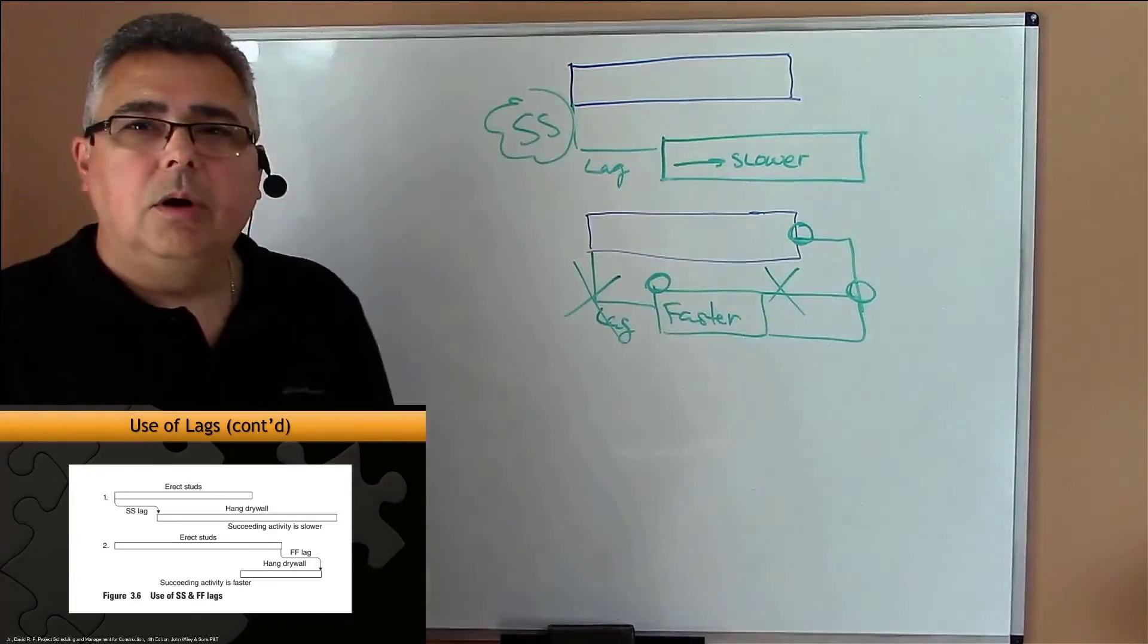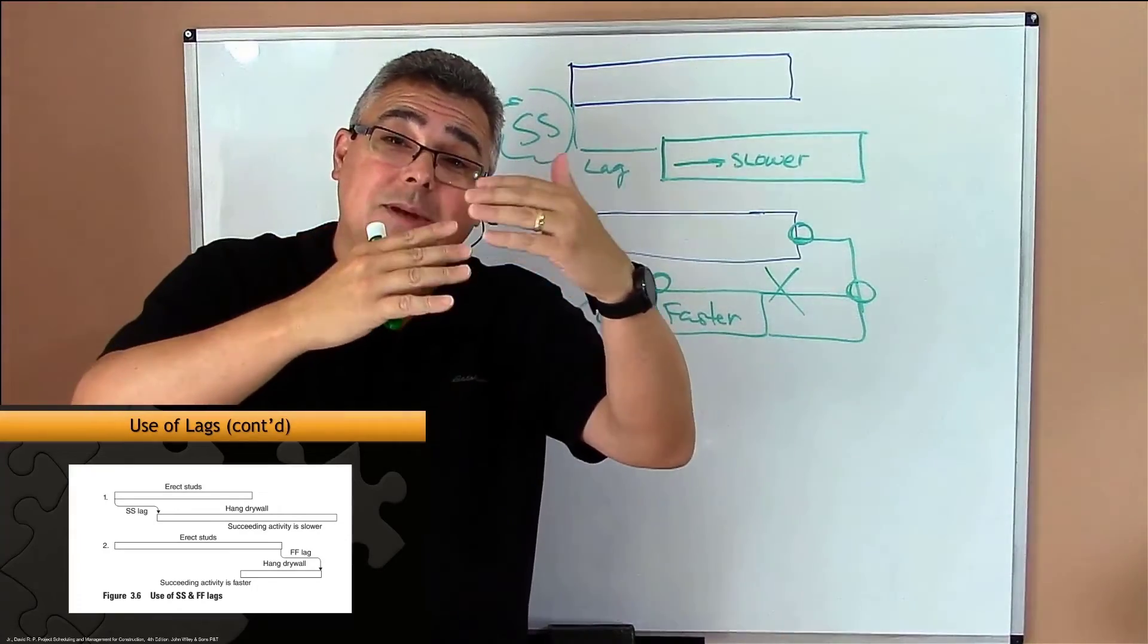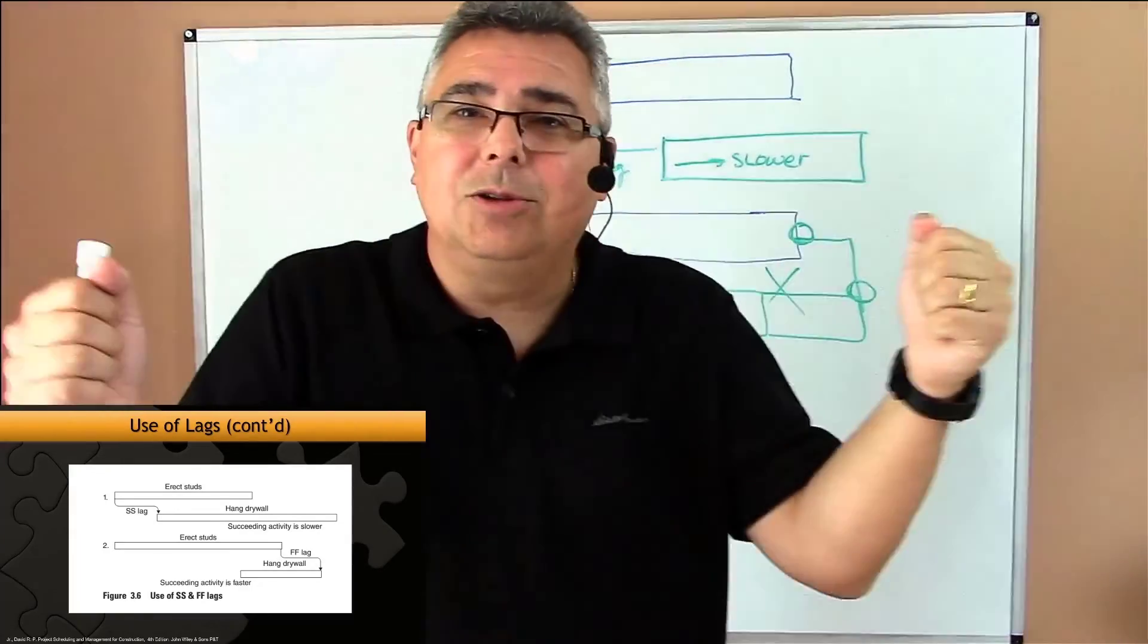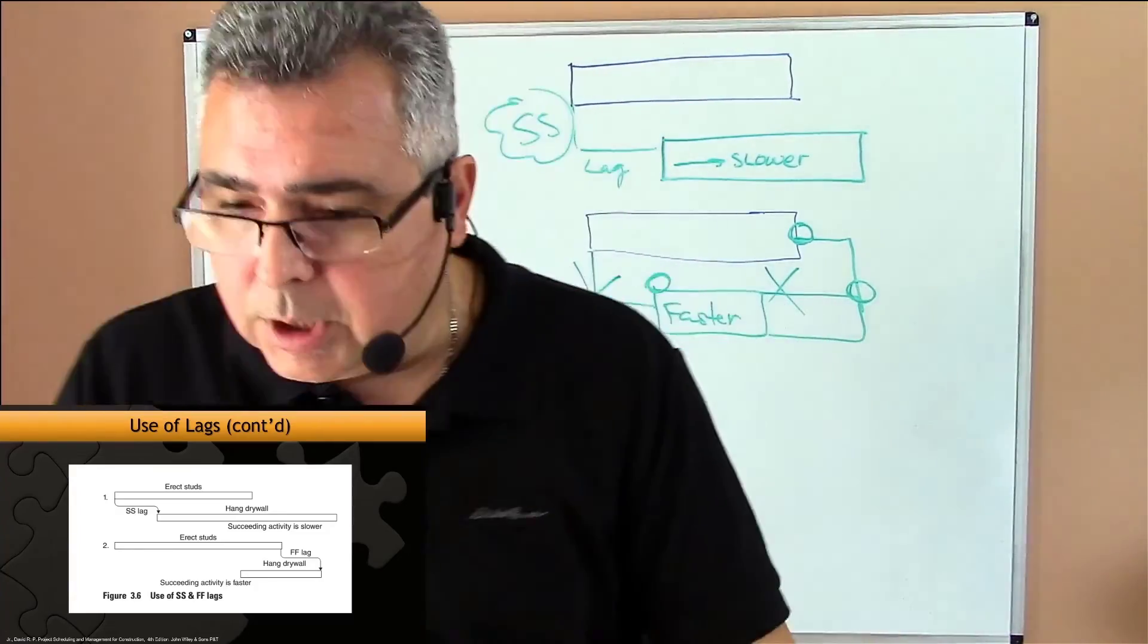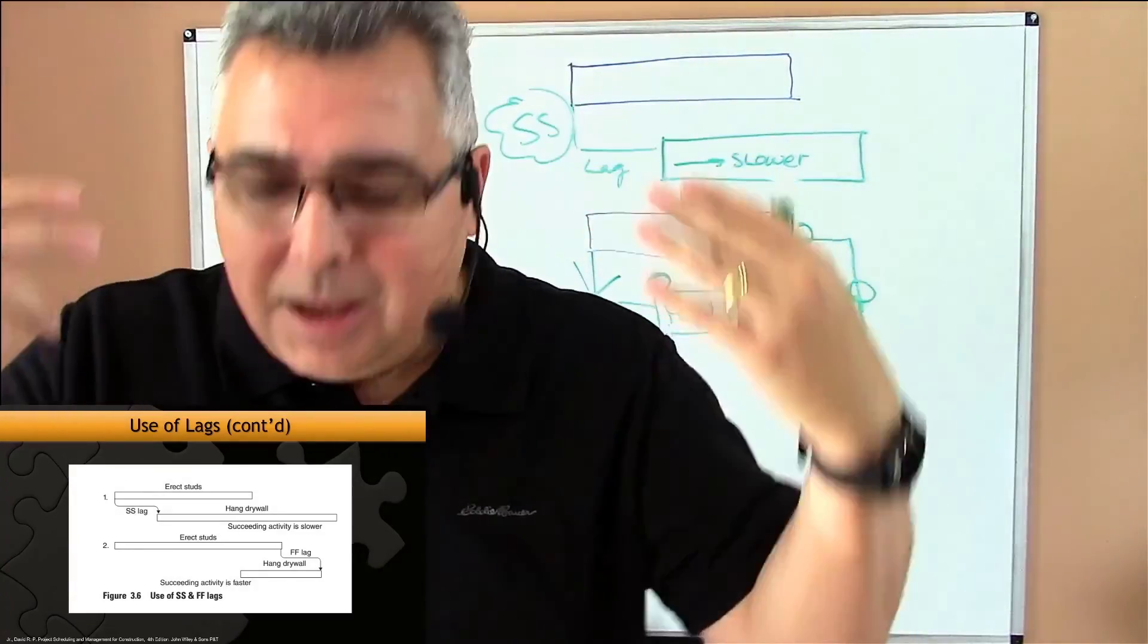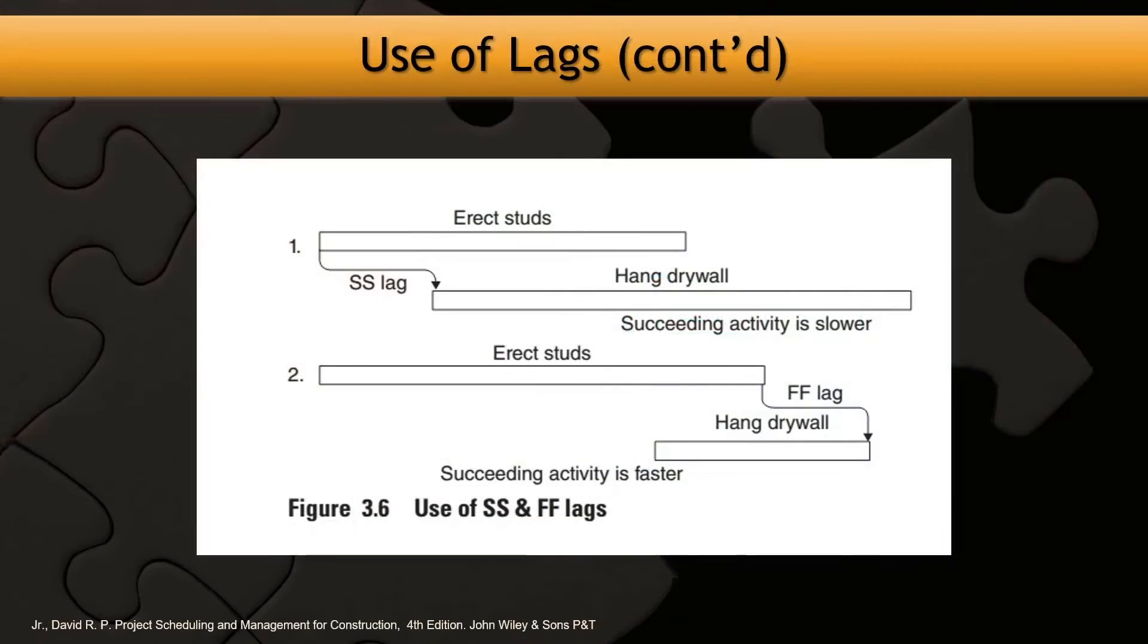Because in that situation, you calculate the starting time based on the finish date of the activity, and that avoids you having some kind of people holding the drywall waiting for the frame. So that's the situation.